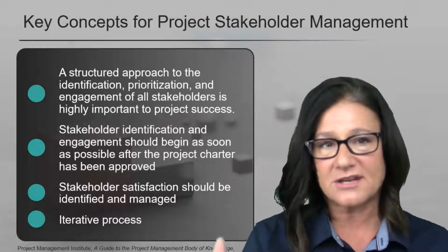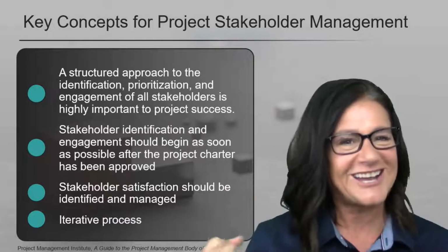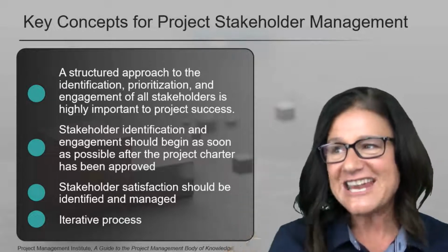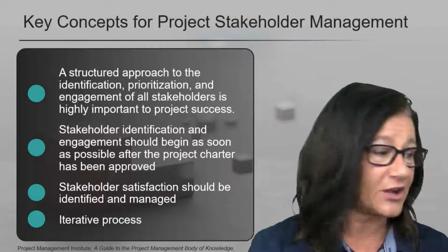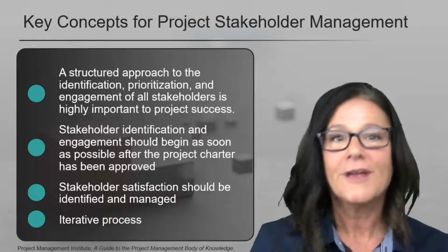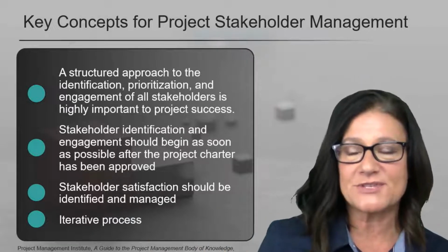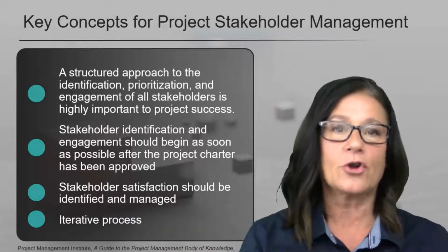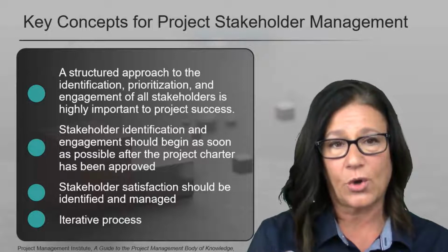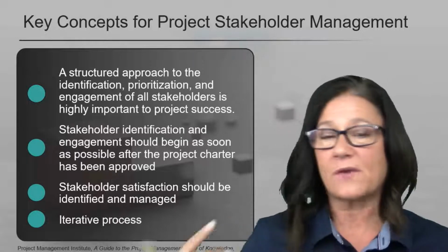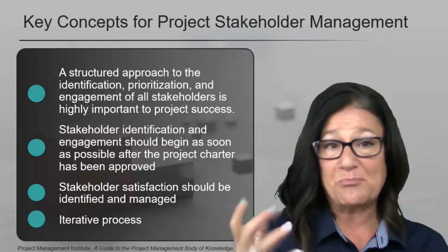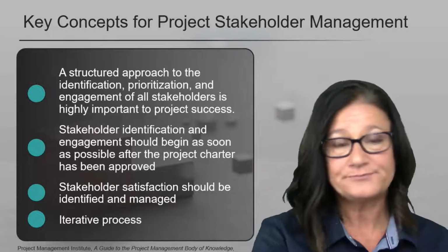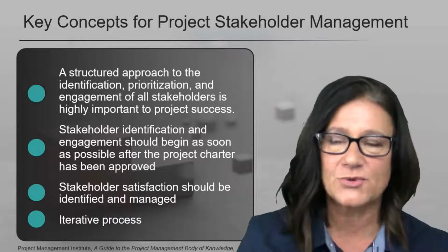Even though your team are considered stakeholders, I want you to kind of separate those out for the purposes of just concept. Stakeholder identification. Maybe you already know your team. So it's going to be the stakeholders that you need to identify, your customer, that kind of thing. This is iterative, meaning over and over and over again as people come and go on the project. Or you've got a bunch of projects, so you have one big stakeholder register with everybody that you're dealing with, who they are, how you interact with them.